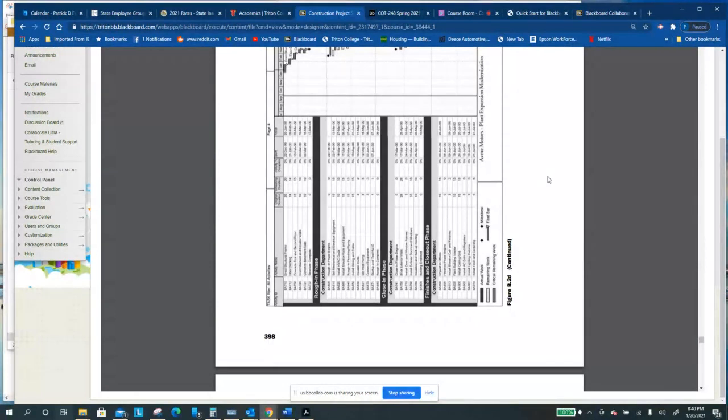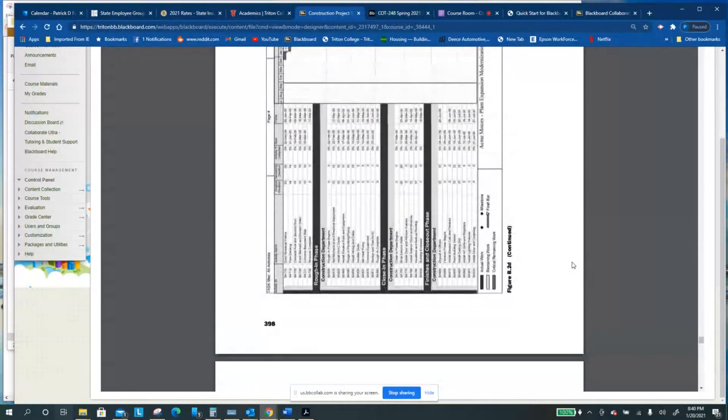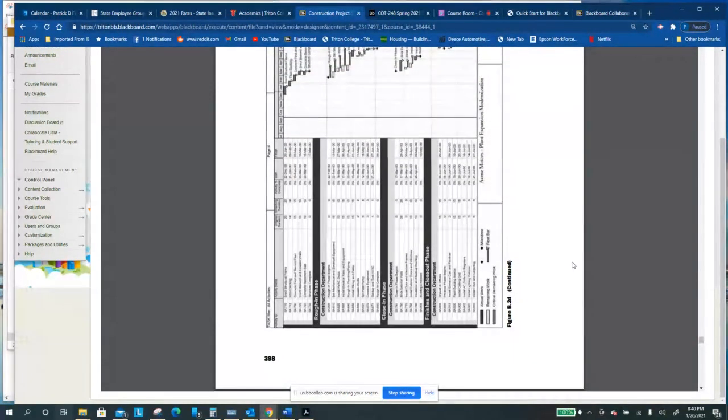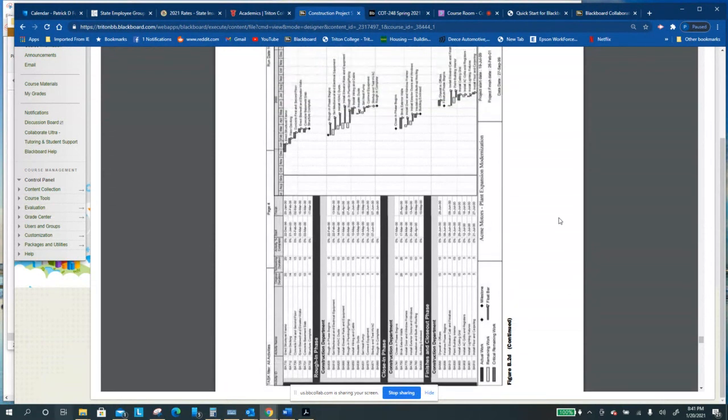You'd often see this, and this is often created by a general contractor when he's bidding the project. Often when someone's bidding a project, they not only ask for a price, but they ask you to identify the schedule: how fast you're going to do the work, how long it is going to take. Sometimes an owner will have that already determined, and the contractor has to plan and price around that. Oftentimes you'll see expedited projects.